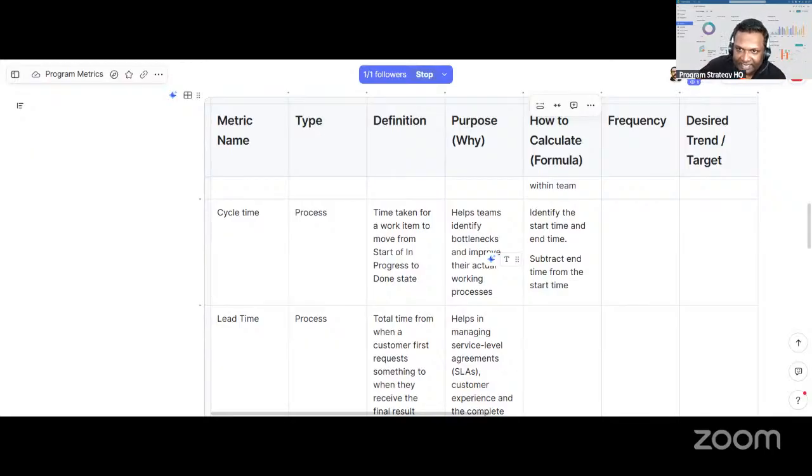When we calculate cycle time, there should be standardization among the work items. Only then will it be apt. Take the example of an IT team on a Kanban board. The kinds of requests an IT team gets are almost the same. So for that team, over a period of 1 month, how much of this kind of work they are able to do, that is the cycle time.